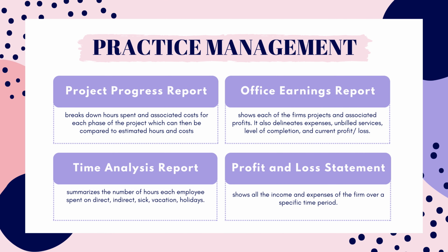Project Progress Report breaks down hours spent and associated costs for each phase of the project, which can then be compared to estimated hours and costs. This report also shows cost of consultants, overhead, and reimbursables. Project managers can see if the project is falling behind based on hours and costs spent and take corrective action as needed.